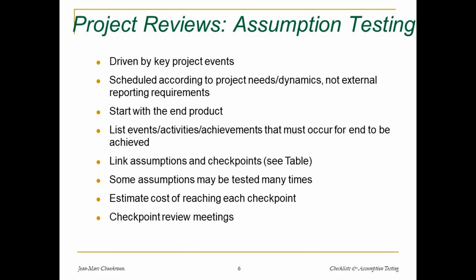You want to link the assumptions to the checkpoint for you. What I call the checkpoint is the project review times. For each of the critical assumptions you have determined, you have to determine when in the course of the project they need to be checked. Sometimes very regularly, maybe every week, sometimes less frequently. And so that way, the rhythm of your project is tied to the need to verify, monitor, and check the assumptions.